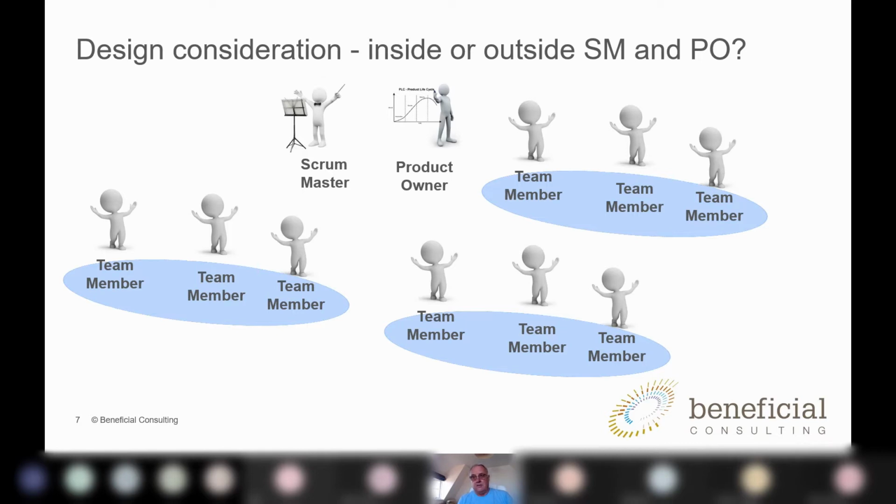If your product is incredibly complex, let's say these teams were working in an exploratory agile, then the product owner will probably be embedded in the team, because the team is discovering every sprint. The product owner would need to keep their arms around what's happening. The product owner would want to see what feedback the team is getting from customers or stakeholders or wherever they're getting their feedback from, and then adjust the product backlog accordingly.